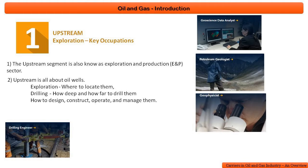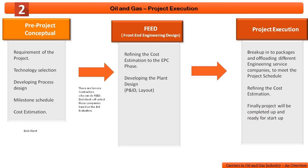Now about how oil and gas projects are executed. Companies like PDO Oman and KOC will identify the project requirement - why it is needed. After getting the requirement, they evaluate available engineering technologies for exploring and purifying oils. Based on the technology, they develop a process design, then estimate the schedule - the milestone timeline - and the cost. These things are done by the end client.